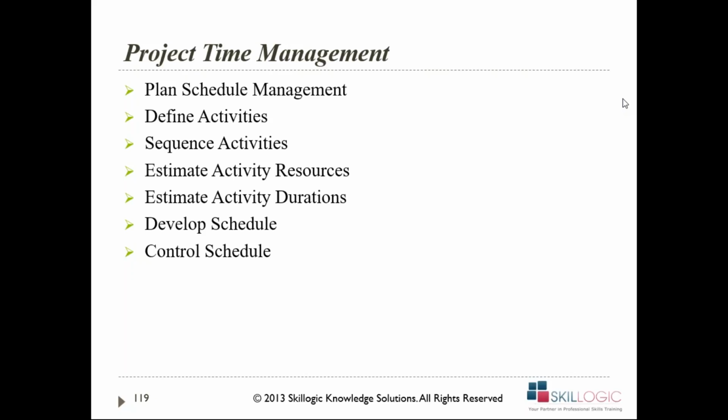The project board can either approve it, reject it, or defer it for the future. They might just say, okay, we'll take a decision on it later. Now, whatever is done needs to be recorded in the change log. If it is approved, it needs to be built into the plan documents and executed, and then the change is evaluated to find out if it's successful. If not, again, a change has to be raised for whatever changes have to be made.